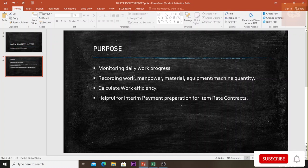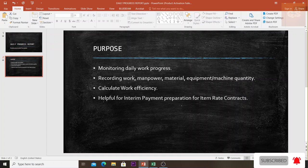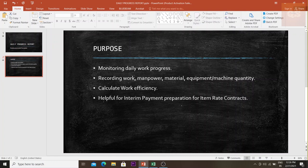In your project there might be different teams and different engineers. Each engineer might have different supervisors under him, and each supervisor will have a set of teams — such as foremen, electricians, and plumbers. Each team will be doing particular work in different areas, and you can get an idea of what work has been carried out by each team using the DPR.